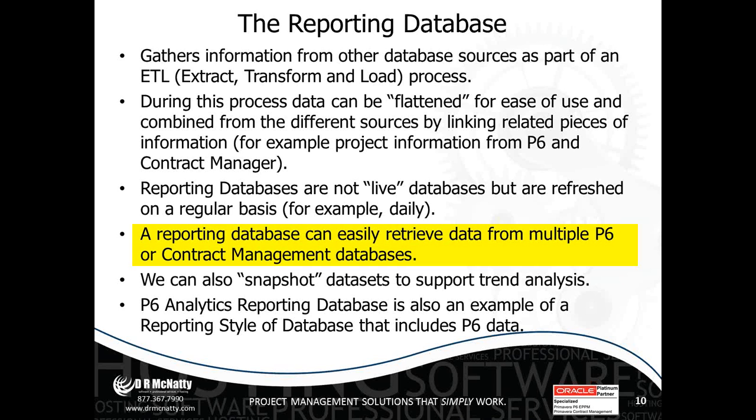We had one that we produced for a client that had about 600 inspectors working in the field on a daily basis, and the managers wanted to know what was going on a daily basis. And so by pulling from multiple databases, multiple sources of information, everything was processed by 9 o'clock the following morning, and at 10 o'clock the following morning, they had reports of what was going on in the field as of the end of the previous day. That is how project controls reporting really should work.